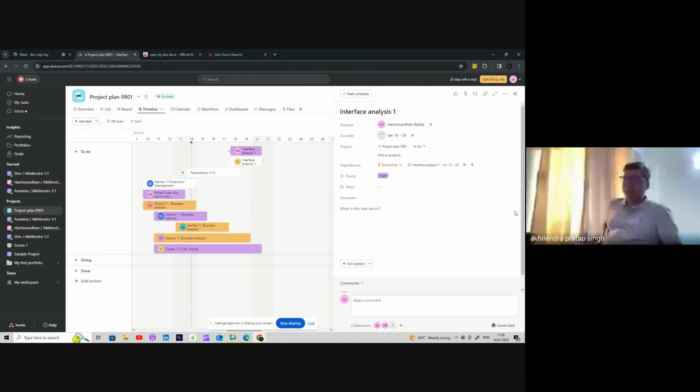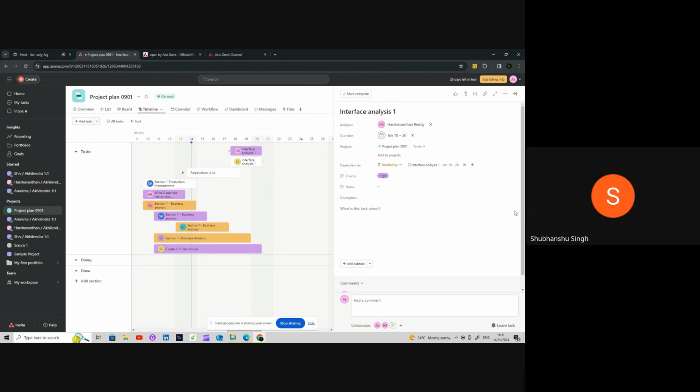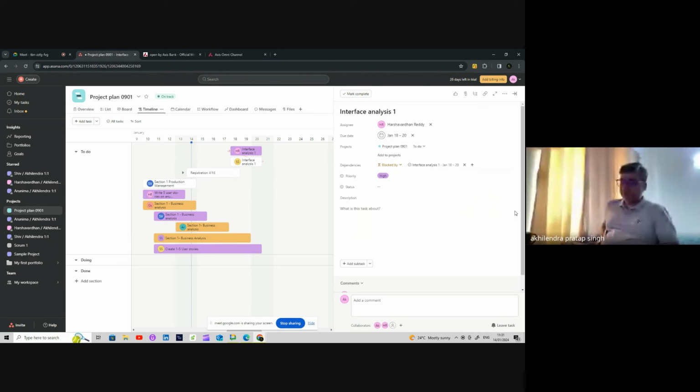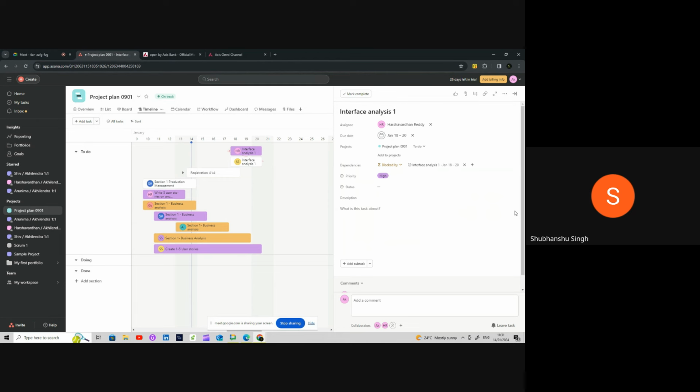So it's not collaboration, but it is something you must highlight. For example, let's say this week you didn't mention Harsha. Your due date is the 20th. We are having a call on the 17th, 18th, and you say, well, I only have 2 days and Harsha is yet to deliver his piece of the work, so I cannot do it. Then your project manager will be after your life that if you had a dependency, why did you not raise it earlier?